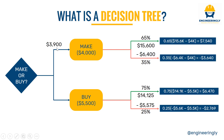The difference between the two make outcomes gives a path value of seven thousand five hundred and forty minus three thousand six hundred and forty, resulting in three thousand nine hundred dollars. For the buy case, the path value is three thousand seven hundred dollars. Since the bigger number is better, we select three thousand nine hundred dollars and go with the make option. I hope you liked the content — please consider subscribing to the YouTube channel and following us on Instagram and LinkedIn.